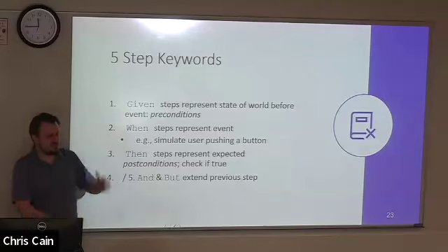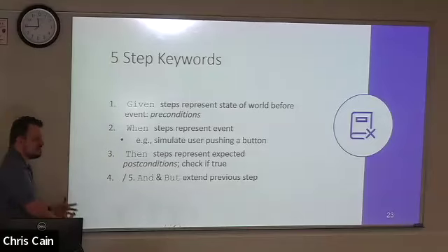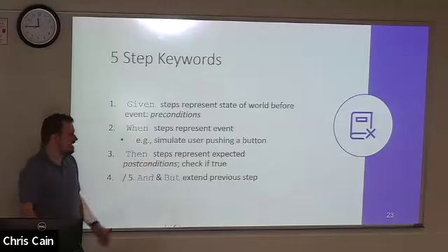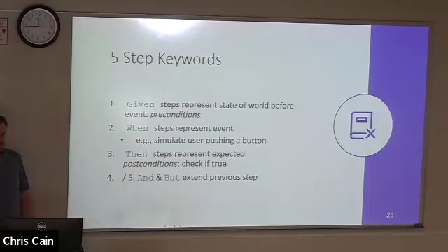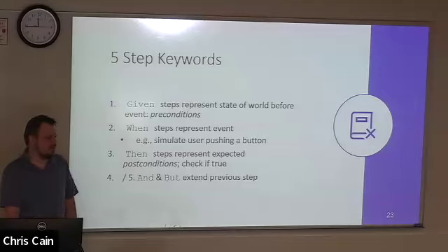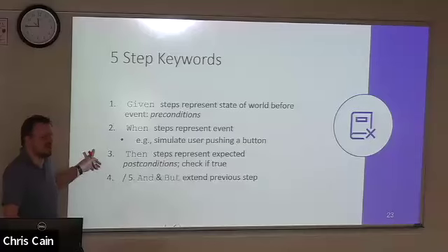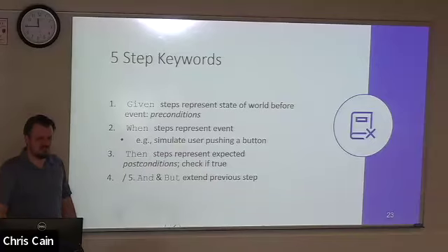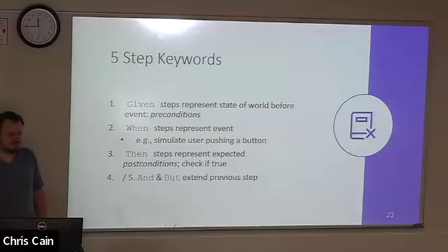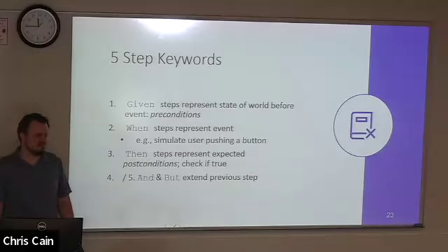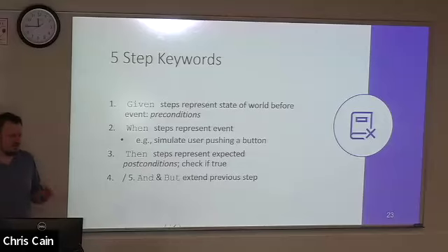If you write a list of user stories and those user stories are complete, then if you convert those user stories to scenarios, convert those scenarios into tasks, and complete all of those tasks, then you will have an application that does what the client wants. You've converted from the non-technical to the technical and implemented everything. So there's enough in that first sprint that there will be a significant number of user stories. And that grade will be team-wide. Everyone gets the same grade for just the user stories part of this, what's there and what's not.